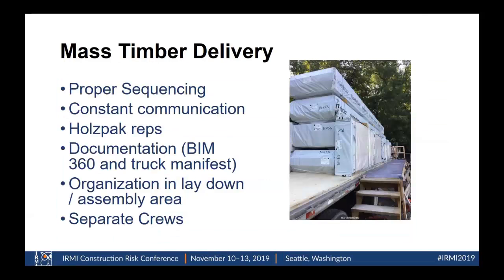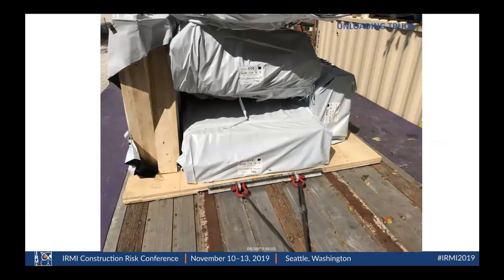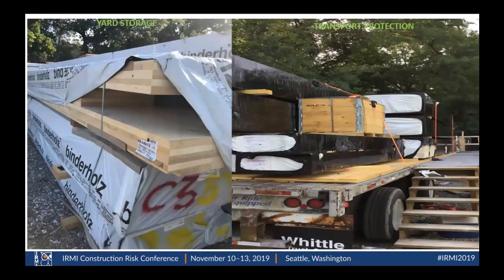I'll show you some pictures of that in a minute too. When they came in the Connexes, we had a flatbed truck that you'll see in this next slide, and we just pulled the pallets out of the container and then put them on the back of that flatbed that remained in place for 6 months, and then we shook out the yard and finished our assembly.